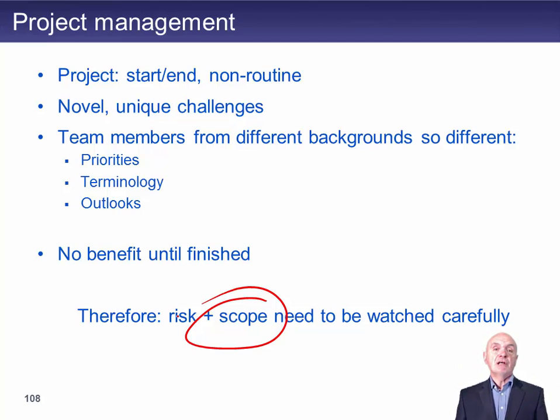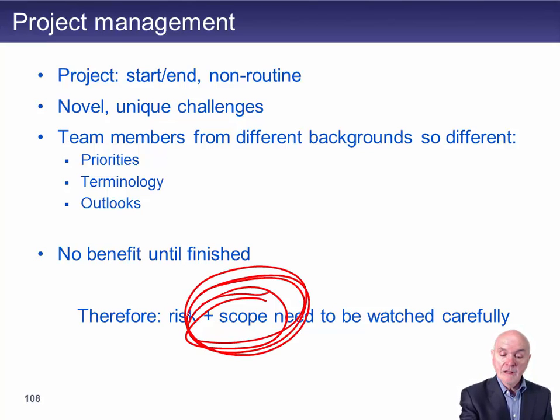And then as the project develops, they say, well, couldn't we do this? Couldn't we do that? Couldn't we do the third thing? And you find that then the project begins to grow, or maybe you have to scrap some of the work you've done and almost start again from the beginning. And scope, I think, of all the things that go wrong with projects, it is project drift, really, where the scope, what's going to be accomplished by the project, is not properly controlled.